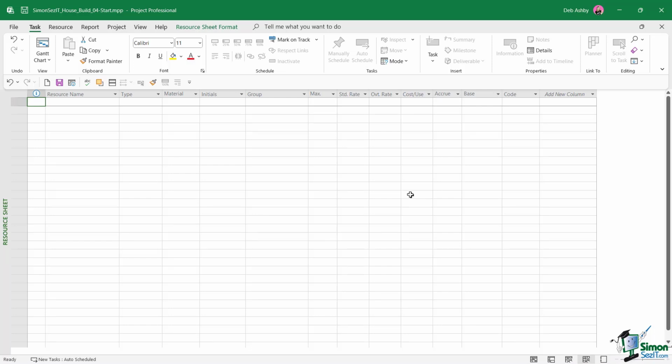Now, we might need to prepare a budget, and this in general wouldn't relate to any particularly accurate estimates of costs, but I might say, for example, that I think the labour costs on this project are going to be $40,000. Possibly the material costs are going to be $30,000, and the legal costs are going to be $10,000, and so on. So these are just very rough estimates. Now, I also might come up with some budget figures, and then during the course of the project, I'm going to want to see how the costs are progressing in terms of budget. Now, rather than do all of those things, I'm going to take one element and show you how to deal with it.